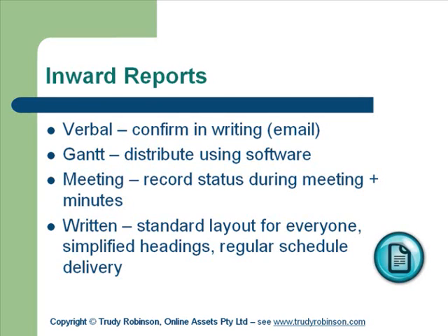When in meetings, I'll also give you an example of a minutes template. I find that the easiest way to take minutes is to do it there and then. So you have a data projector, you have your laptop, and you do it there and then, so that as you're updating it, or as you're coming up with issues or risks or whatever it is, you can do it there and then. Everyone's approved it because they're in the room, and as soon as you can get out email, it's out straight away. You don't have to take 2 days to then update and write a bunch of minutes or try and get the chicky babe down the corner to interpret your handwritten notes.